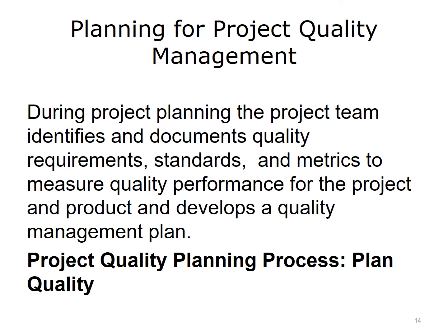During project planning, the team identifies and documents quality requirements, standards, and metrics to measure quality performance for the project and product, and then develops a quality management plan. The project team should focus on managing customers' expectations by meeting their requirements. The team should not attempt to exceed requirements or provide extras.